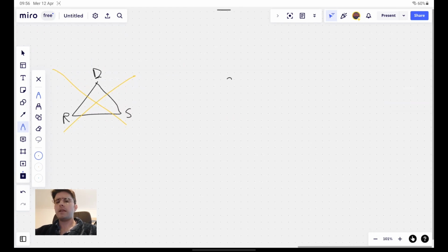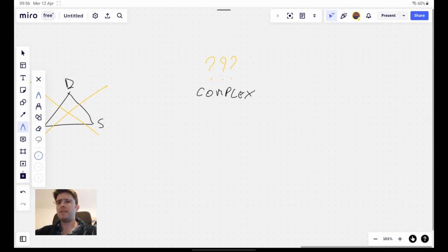First, let's remember, most tasks are complex ones. Thus, any estimate that we do has the same value of rolling a dice. We don't know how long they take. We just pull from our experience how long it might take. In fact, rolling a dice normally leads to more accurate estimates, as it tends to be less optimistic. This in turn means that most tasks are going to be late. We cannot estimate what we don't know, after all, and the project itself starts to be late pretty early.